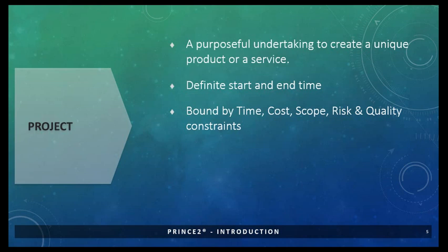So they appoint a small committee. The responsibility of the committee is to look at what percentage of test cases can be automated. And after the study, they realize about 40% of the test cases, it's about 400 of the 1,000 test cases, can be automated, and that would result in better utilization of the skilled testers and also reduce the cost about 25%.